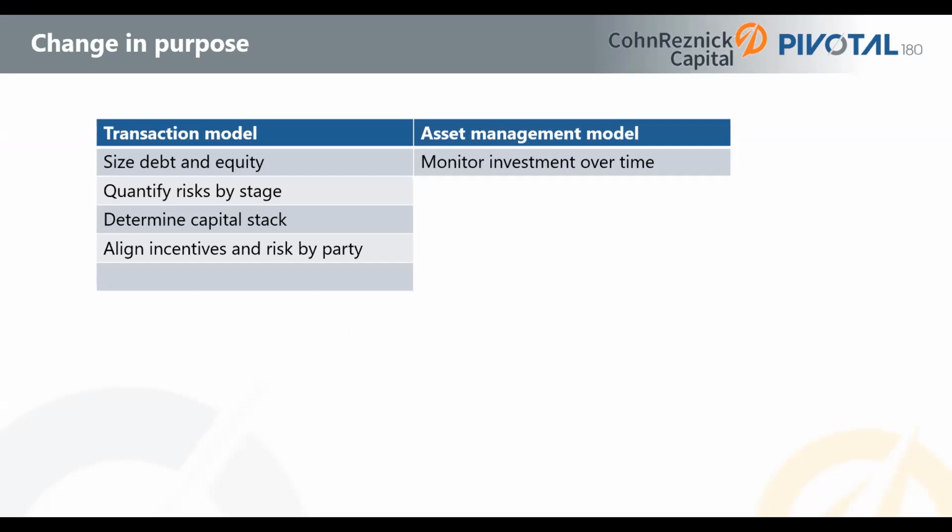So is our project cash flow sufficient to cover our costs? Do we have enough cash or working capital in the business, perhaps? Sort of the usual things that any finance team on a project would be considering. The other thing is we would need to bridge the valuation now between the transaction. And what I mean by bridge is compare the valuation based on actual performance of the project with how we expected the project to perform when we hit financial close. And those could be really different in the end. We see many of those cases, but we need to compare the valuation. What worked and what didn't.